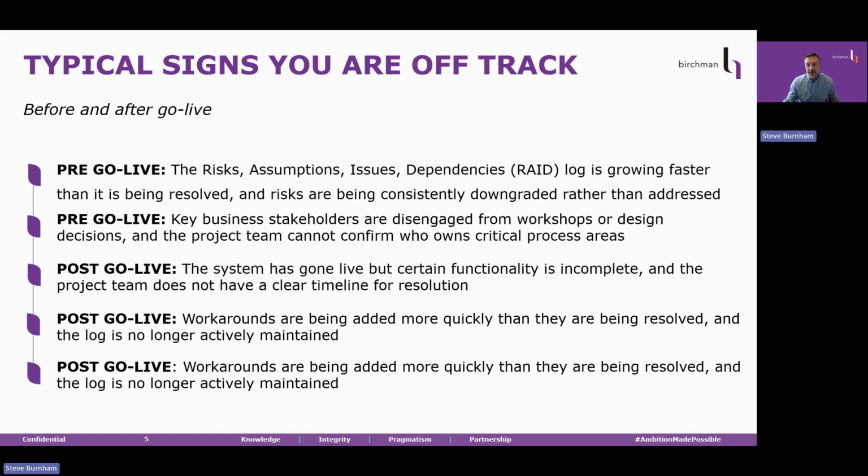The risks are being downgraded without genuine justification. The team has shifted from managing the program to managing the perception of it. This distinction matters. A steering committee seeing a clean RAID log on a troubled program is being misled, not reassured, and this is one of the most reliable pre-go-live indicators that governance has broken down.